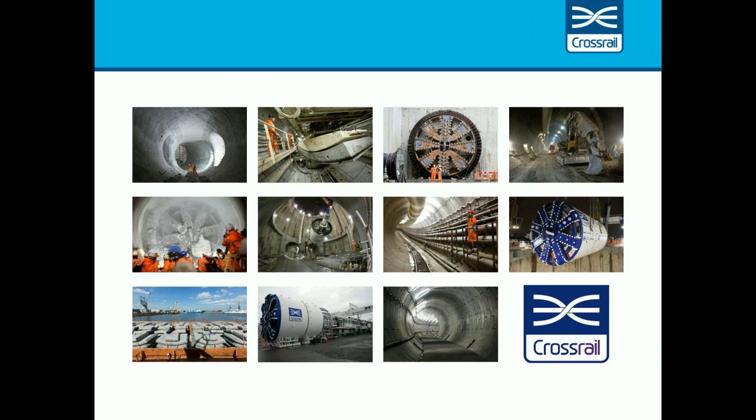Well, okay, so design management is managed through a gate process. I think one of the things that Controls has done a good job of highlighting early on is that where we've had schedule pressure on completion of designs, we have essentially pointed out the need, and the program has reacted to breaking down those gates into what we call mini gates. So where design has shown signs of potentially delaying construction activity, because of course we're not building off a completed design, we are designing and building as we go in some cases, we have moved to a mini gate process in order to get the necessary parts of the design out to the contractors in order to minimize construction delays as much as possible.